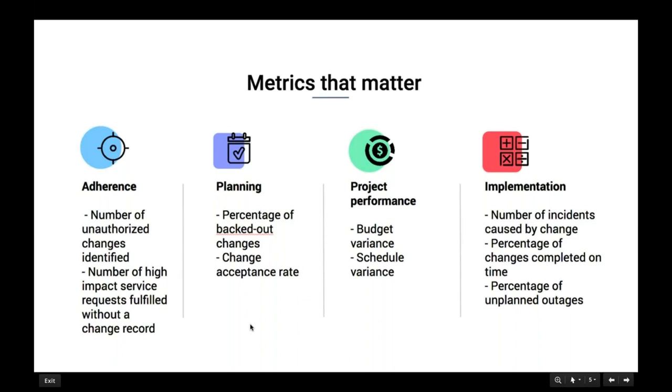But as with any project management tool, we have to measure the estimated time versus the actual time. Likewise, we have to measure the estimated budget versus the actual cost spent on the project. ServiceDesk Plus also does that. We can record the estimates and the actuals, and with that data, we can run a report and identify the variance between the budget and the cost. I'm sorry, the time taken, right?